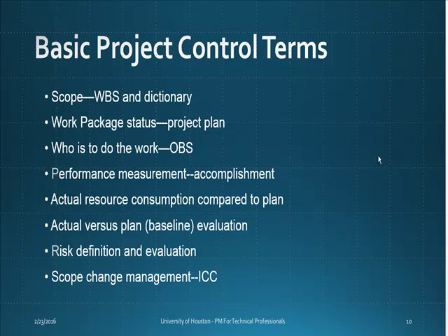Remember the pictures we showed in the class where initially you just think about designing a small boat, and eventually, over time, with a 2% scope increase each month, by the end of 2 years all of a sudden you have a huge boat which looks fancy, but actually way exceeds the original design of your project. In order to manage our scope change, we will need to have an ICC, which stands for Integrated Change Control process.